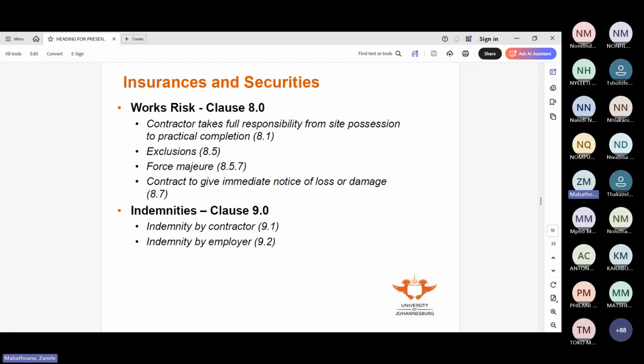The only thing with the JBCC and bill of quantities is that if you had given me a rate per square meter of brick wall, so let's say one brick wall, you say the rate is 495 per square meter, and we had agreed that we were going to build 100 square meters, but then I changed it to make it 180, you are tied to that 495 rate.